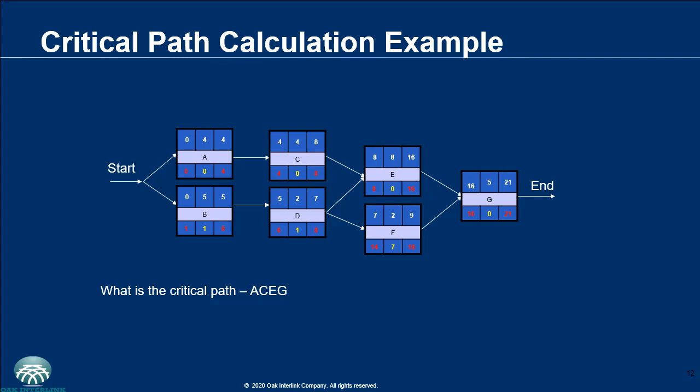And then from E and F, you move to D. To move to D from E and F, you need to consider which of the late starts of F or E you would pick for D, because E and F input into D when you're looking at it from right to left. In this situation, we have a burst.